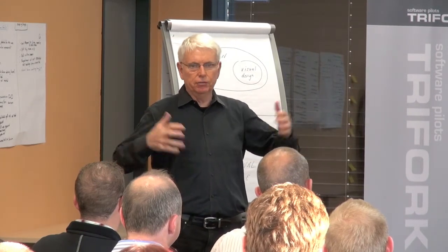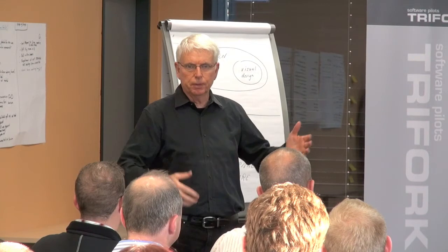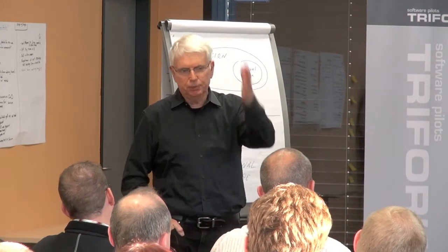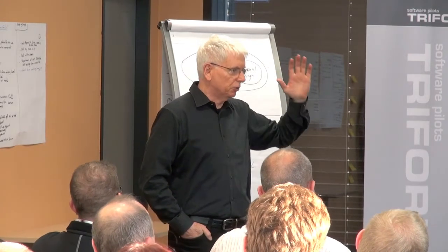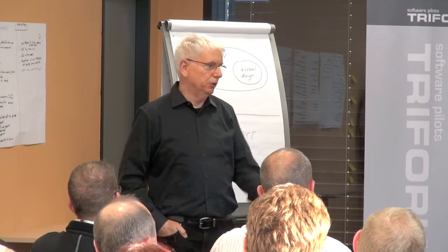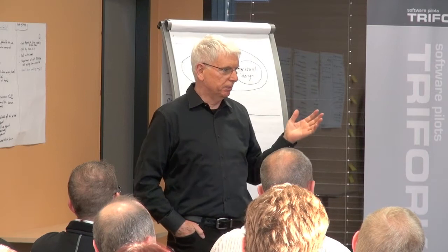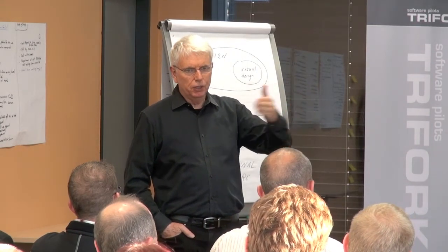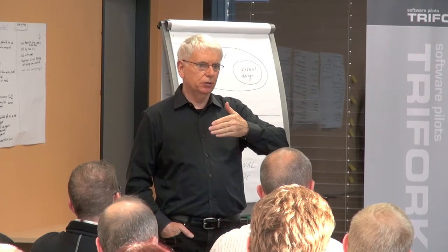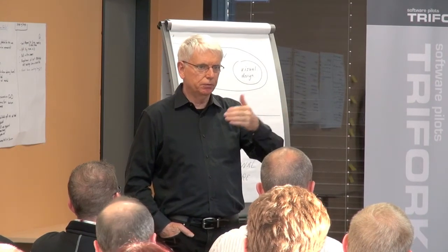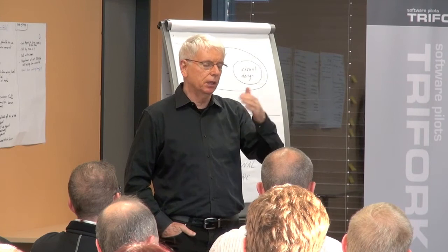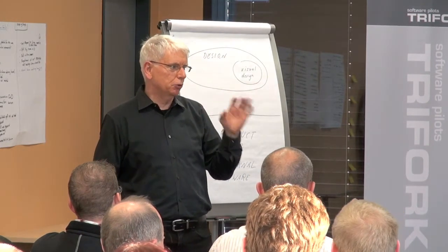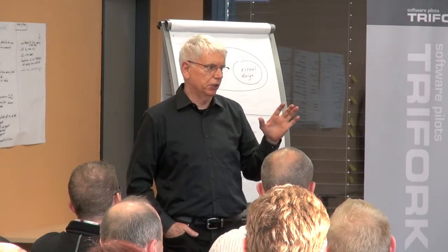You should allocate 5 or 10% of your sprint to the product owner. So it was viewed not as any additional work for the team. The product owner says, I need a prototype today. Okay, that's a product owner meeting, basically, with only one person, whereas most of them had more people. One of the side effects of that was not only good user acceptance, but one of the highest performing, probably, Patient Keeper had 6 or 7 teams. It's the highest performing group of 6 or 7 teams that I've ever seen.